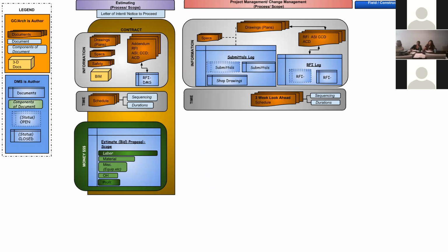When it comes to actually building and we get into the granular level, the framing component is not 10 days consecutively. It's usually 4 to 5 days, months prior to doing the interior wall framing.